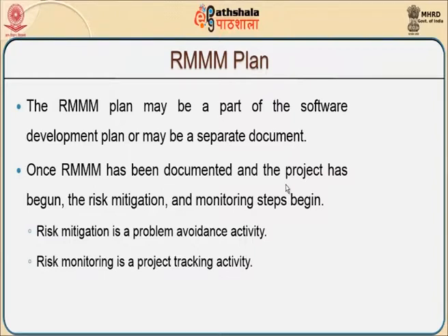Because of this, the RMMM plan, which is mitigation, monitoring and management, is a part of the software development plan and may be a separate document. This plan has been documented and the project has begun, starting from mitigation and monitoring as a beginning stage. Because of mitigation, we try avoiding problem activity. Because of monitoring, we track every activity of the project.